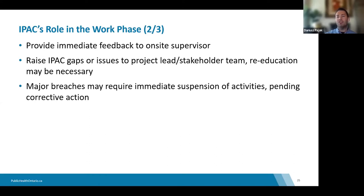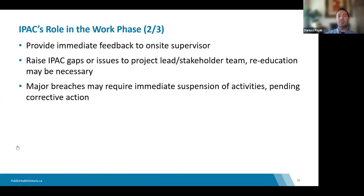If cleaning staff are doing significantly more work, that's your clue to go back to the contractor, liaise with them, and have them address any issues. Any tracking of dust or containment breakdown needs to be addressed — you want to make sure dust is not migrating outside the construction space. Depending on the findings, you may also have to put a stop work order in place, requiring individuals to stop activity until breaches are addressed.